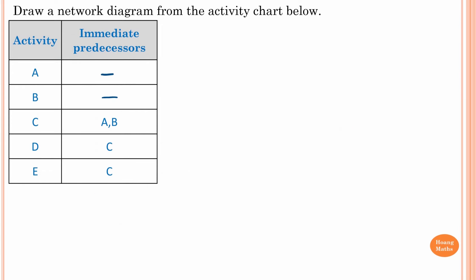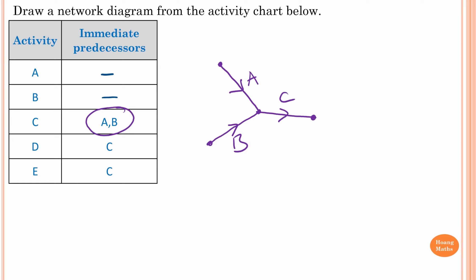For the next example, A and B have no immediate predecessor. A and B are immediate predecessors of C, so activity A and activity B join together. This is activity A and activity B. For activity C, A and B are immediate predecessors, so this is activity C. For activity D, C is an immediate predecessor, so D is here.